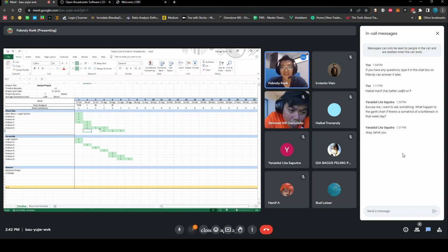I know this doesn't seem like I'm trying to answer your question just now. What happens if there's a lag? Delay in the timelines usually happens because of too optimistic planning. So usually at the beginning we want to do pessimistic planning, especially for a company like mine. Most of the time I've been working with Buddy on a retainer basis, so we're just doing what we have for the months, and then any changes that come in are going to be there. But for a client project I usually do project based, so the scope for things is very tight.